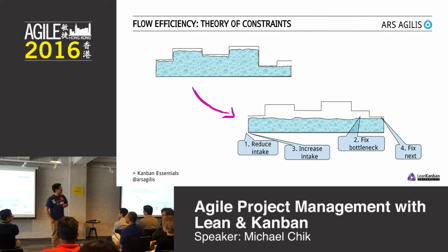So this is assuming that it's repeatable parts of your workflow. Things that happen either with every piece of work that you do, or with a lot of work that you do. In the IT example, it's development. Most of the IT stuff goes through a workflow stage where it's in development. If it's a one-off thing like get approval for launch, that would be somewhere else. So we would not classify it as a workflow bottleneck. Does that answer your question? Okay.